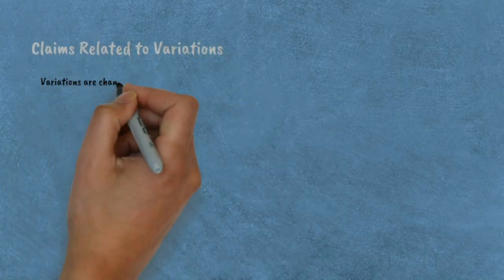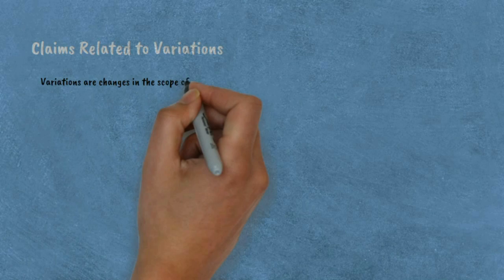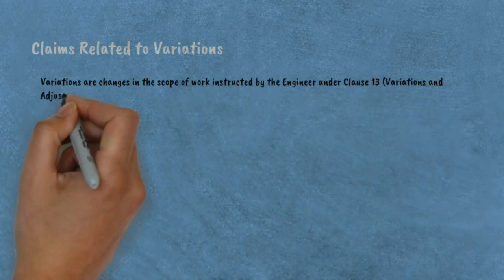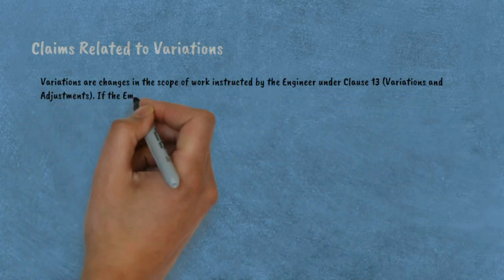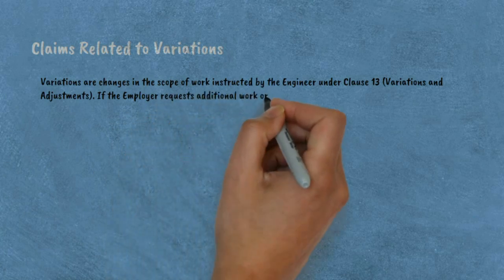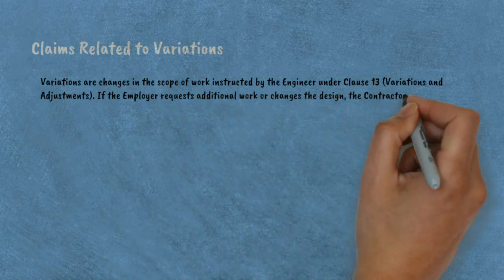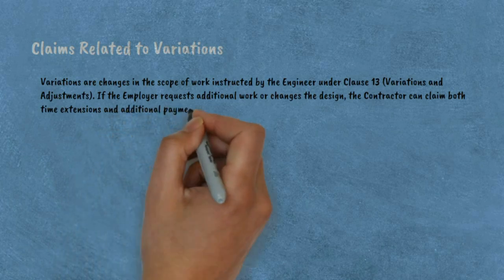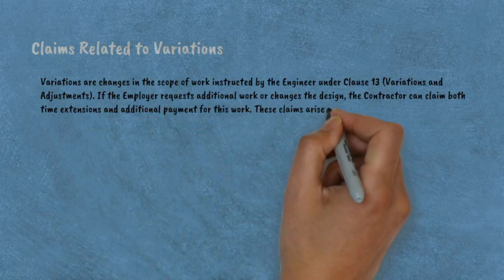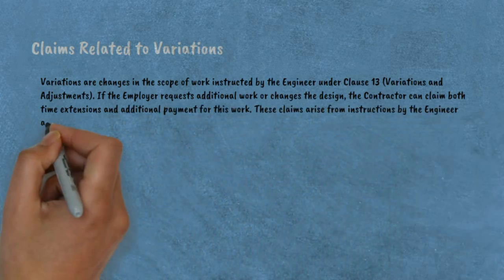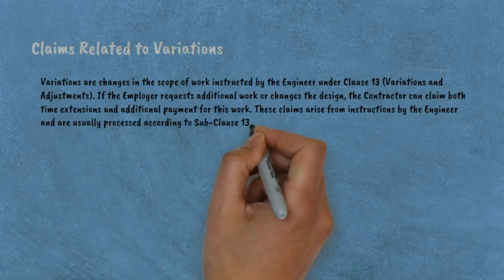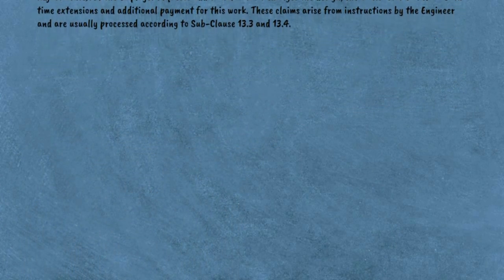Third, claims related to variations. Variations are changes in the scope of work instructed by the engineer under Clause 13, Variations and Adjustments. If the employer requests additional work or changes the design, the contractor can claim both time extensions and additional payment for this work. These claims are usually processed according to Sub-clauses 13.3 and 13.4.